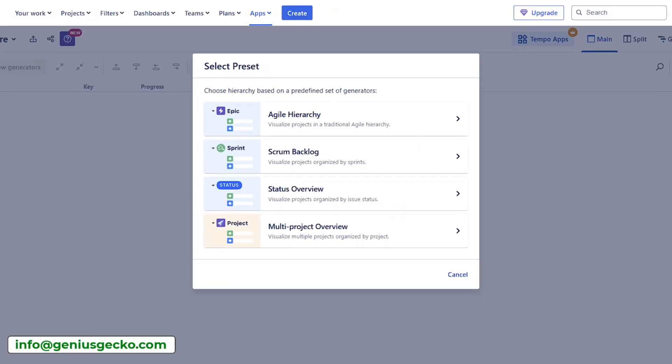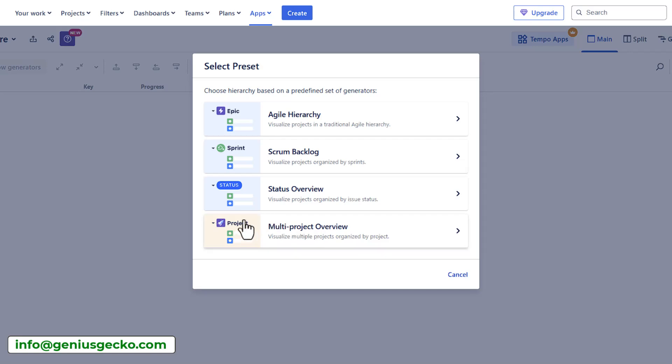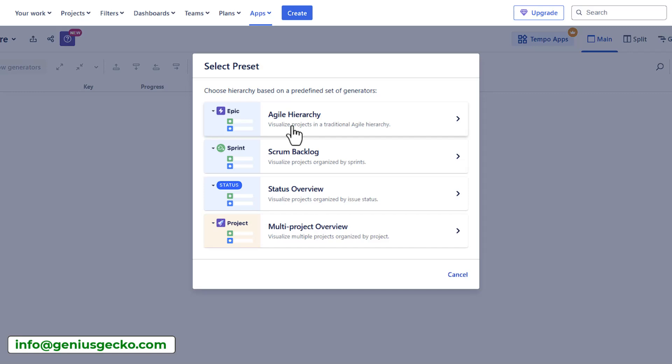Let's say I want to create a multi project overview. We have a template that we can use that will put the project on the very top, create items that would represent projects within my structure. Or you can use other commonly used templates such as agile hierarchy, which we created using the speed mode, the scrum backlog in which the parent or the top level item would be the sprint.